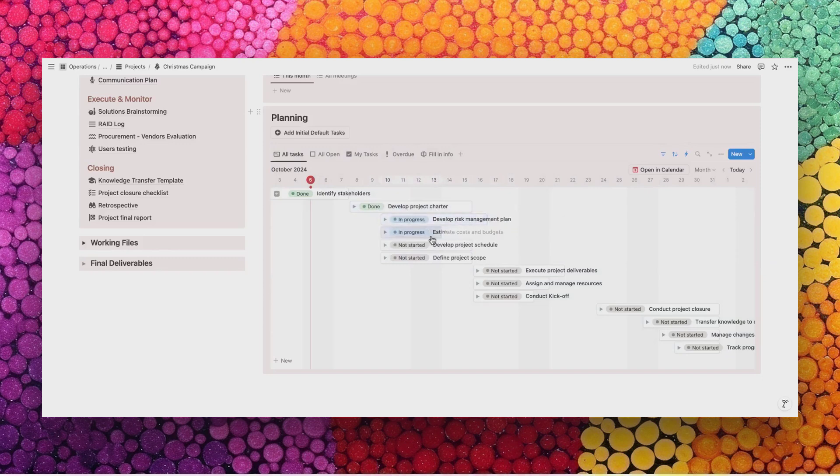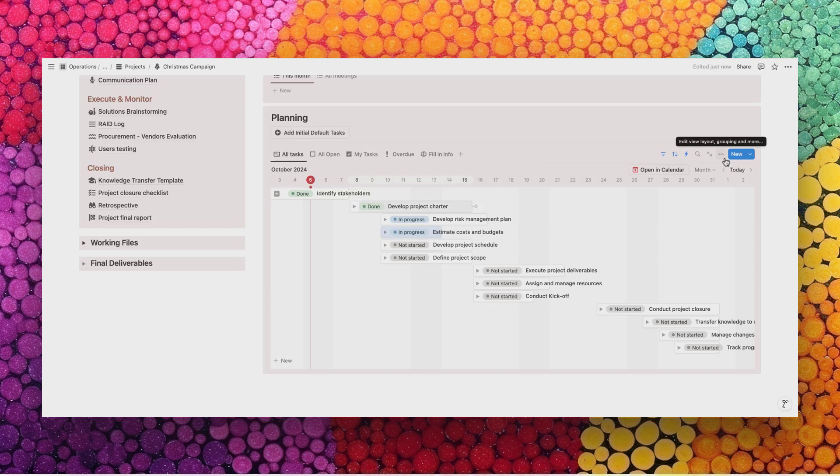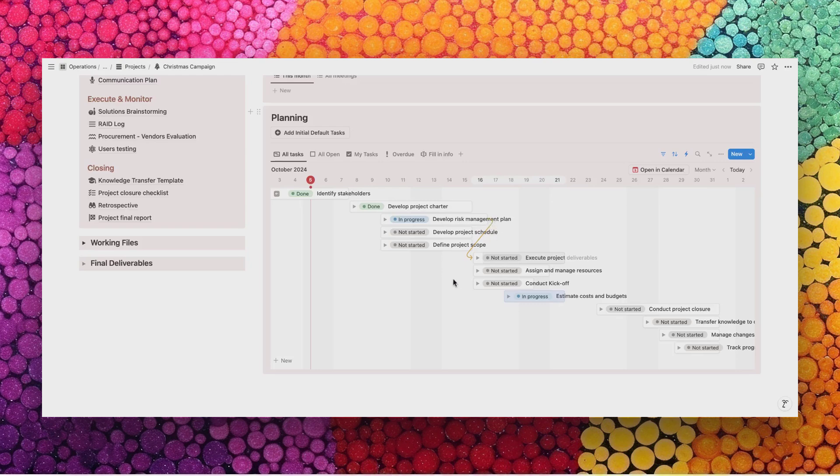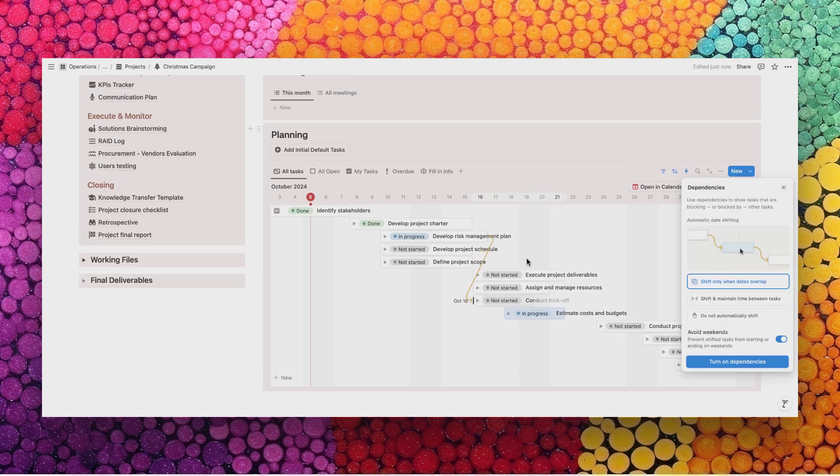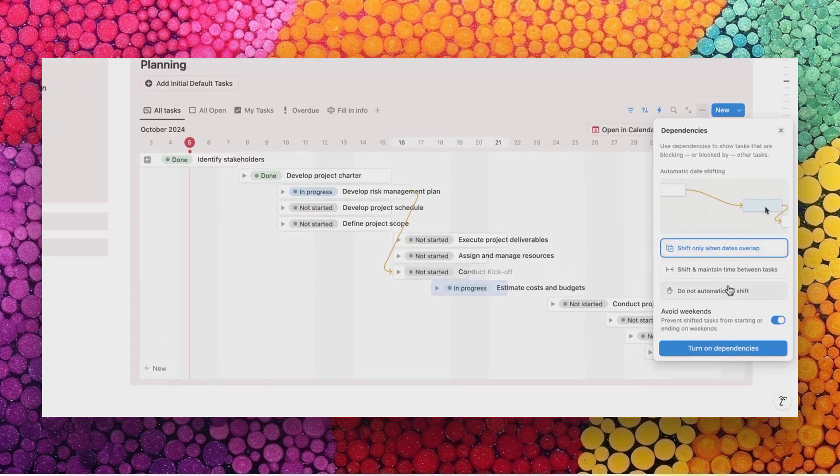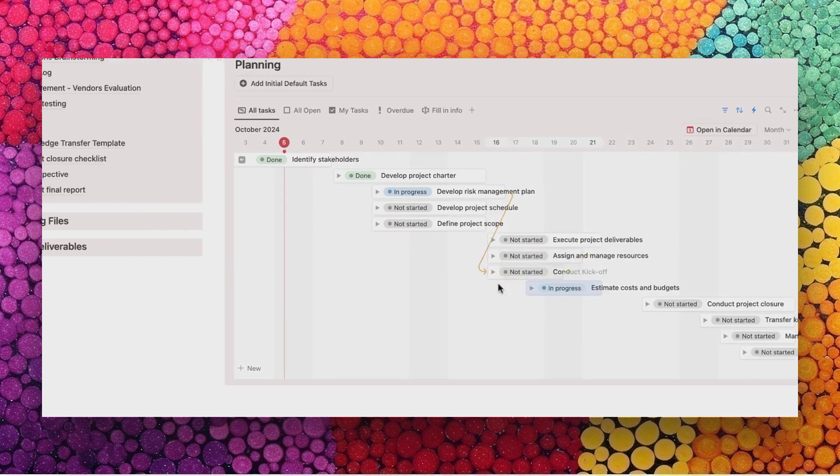Now, something that I have not added here by default is what we call dependencies for projects. You could actually add that in your own copy of the suite. Let's see how. Let's say that the developing the risk management plan needs to be finished before we conduct the kickoff. There is a small arrow that appears on the right of the first task. You can select and drag it until the kickoff meeting task line. You will see that the dependencies menu opens and invites you to decide how you want to set this up. You can choose whether tasks should shift or not, whether you avoid weekends, etc.